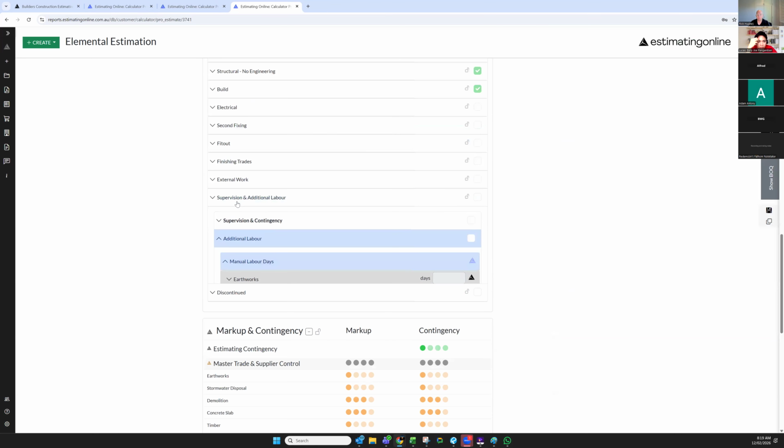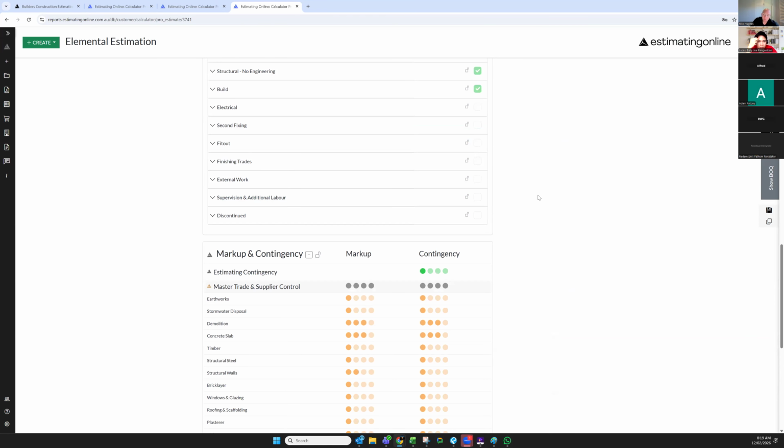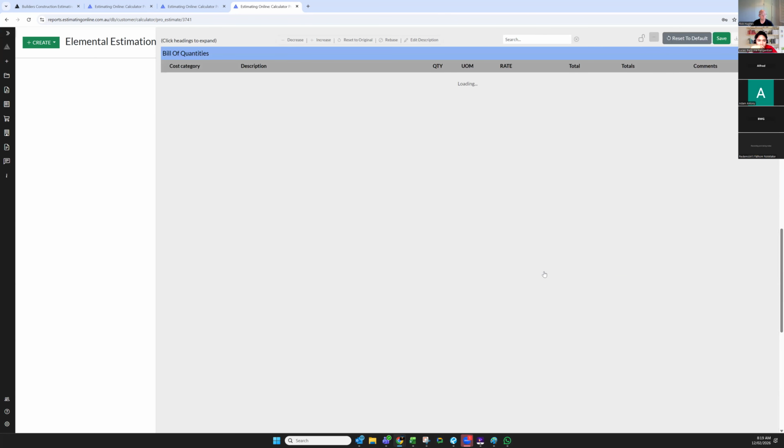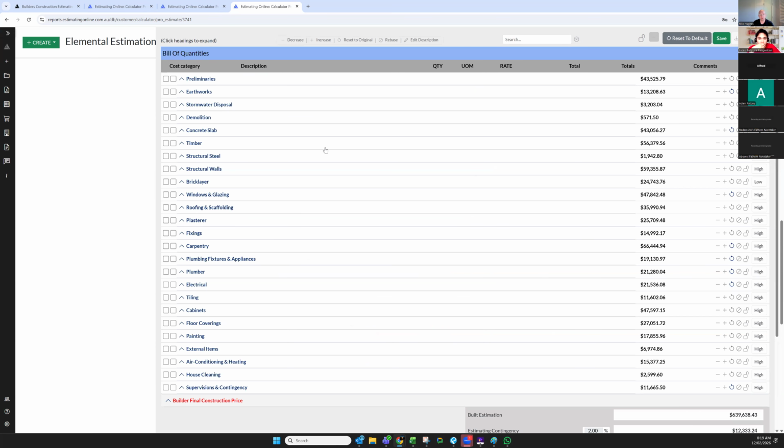The last step, I believe, is the BOQ. There's no point adding bits and pieces of items into the estimations and then reviewing your BOQ. Add all your items into the system, then go into the BOQ. We've got functions that increase pricing really quickly and also change pricing really quickly. I believe, from my experience, once you have a full understanding of the program, this is when you're going to dive into the bill of quantities. It's extremely critical that we get this process right. We can control risk and specification on individual levels.